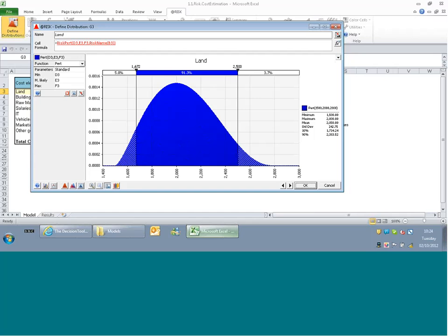And so wherever the stone lands, let's say your first one lands there, you go down, okay, so that's about 2.1 million, and that's your first sample or scenario. You drop another stone, it lands there, your second scenario is 1.9 million. A third stone lands there, that's your third sample, and so on. And you keep doing that over and over again.